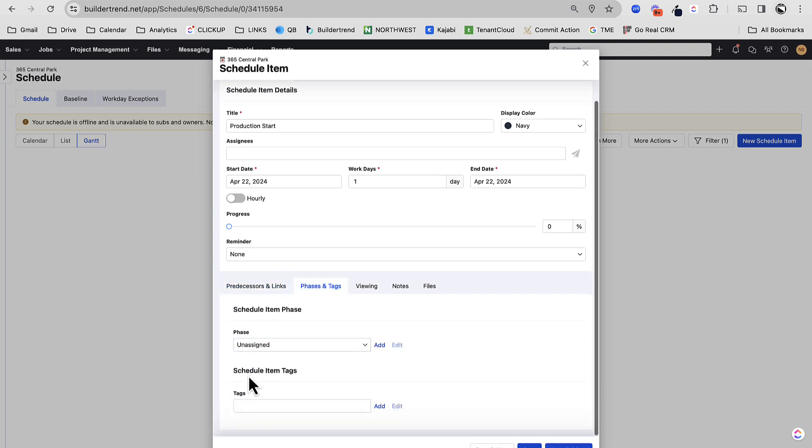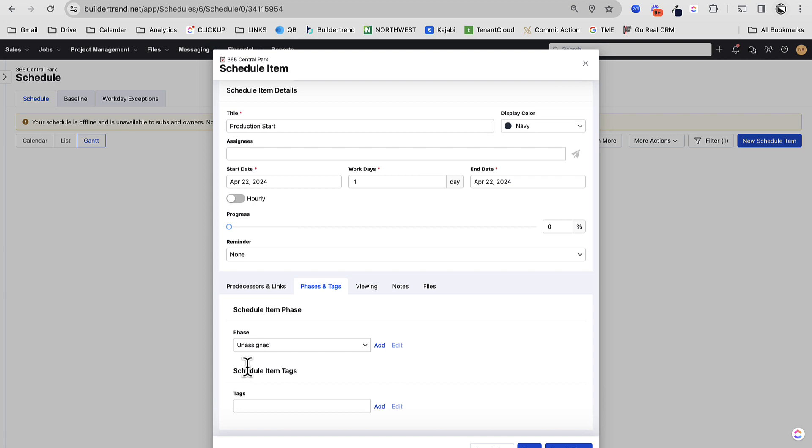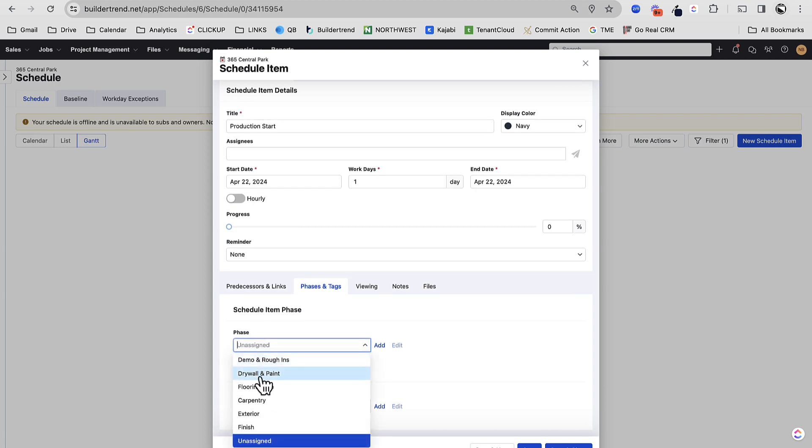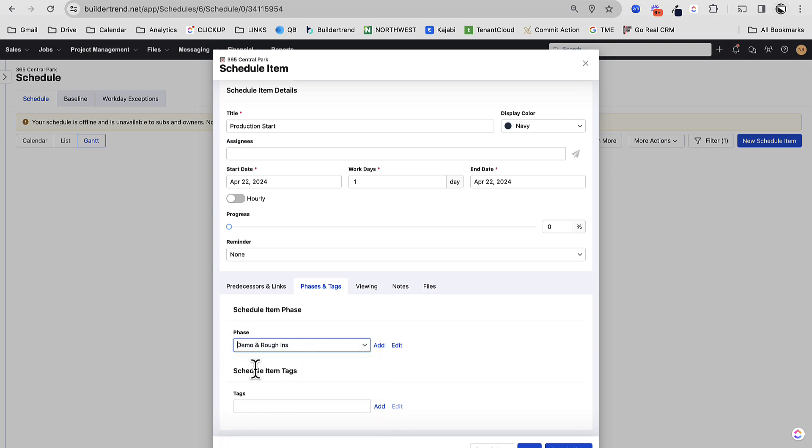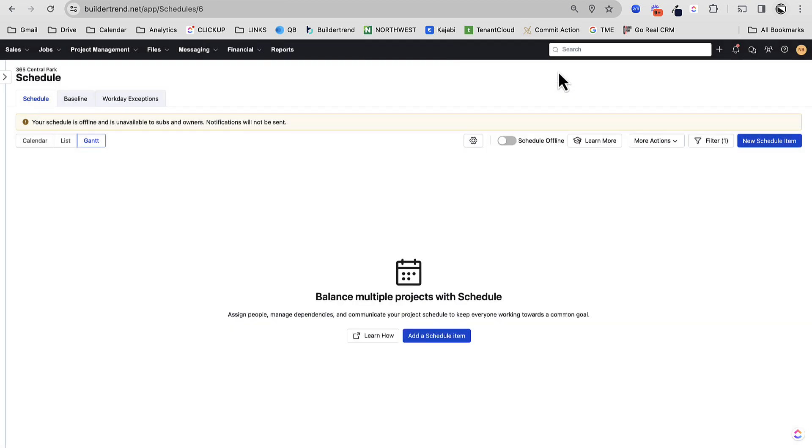So let's build our first schedule item. So what I encourage you to do is to create your first schedule item as production start. Really simple. So production start is my first schedule item. Leave assignee blank for now. Let's just set some date. This is going to be a one workday thing. No reminders, no predecessors yet. I've set up my phases like this, demo and rough-ins, drywall and paint, flooring and tile, carpentry, exterior finish. I'm going to put this as demo and rough-ins. Let's save and close.